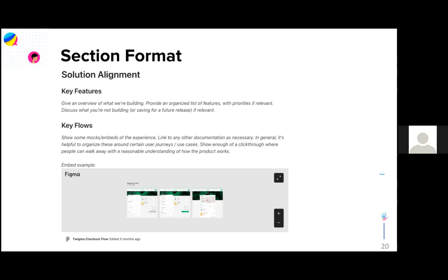Because if we keep the design section as to be done or TBD, something of that sort, when are we expecting it to get a sign off and then begin the development? So you can change that, right? You can get an internal sign off on your problem from, let's say, the key manager, like your manager or whoever is responsible for that business within the company. At least to make sure that you're solving the right problem, because people shouldn't come at a later point and be like, hey, this is not really a problem worth solving. So you get sign off on that. And I agree, you can't go to the clients with a problem saying, hey, is this a problem for you? Once your designs are ready, you can take the PRD to them and then get a sign off. Like this, you can have different sign-offs at different stages of the document.